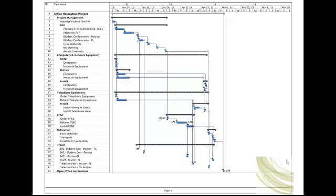The project manager investigates the cost to expedite the furniture delivery. The shipping vendor offers to deliver the furniture in five days for an upcharge of $1,200. The addition of six days allows the project manager to meet the open office deadline and avoid the additional costs required to expedite install telephone tasks. This is just one example of the issues and possible solutions a project manager faces when developing a project schedule. The next lecture will address the interrelationship of time, budget, and scope, and two tools available to the project manager when developing a schedule: crashing and fast tracking. Actually, the two examples we just gave were examples of crashing and fast tracking.